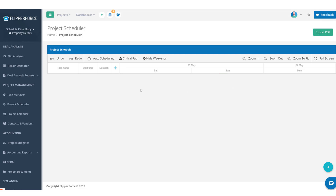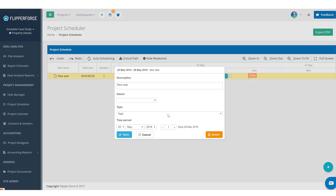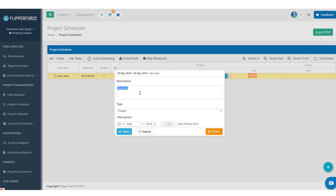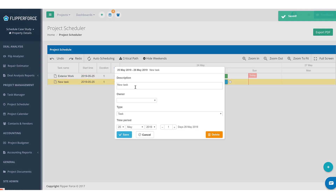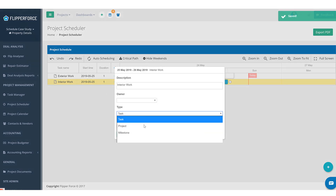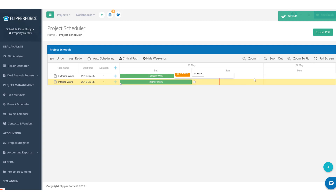The first thing I would do is organize our schedule into two different project types. You can organize your project using a task type called 'project.' We've got a task type here for project, and I'm going to organize it by exterior work and interior work. Now we've got two project task types, and you can organize your work underneath these task types.